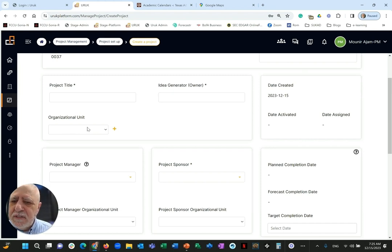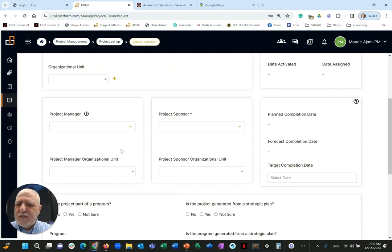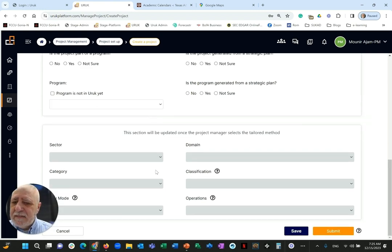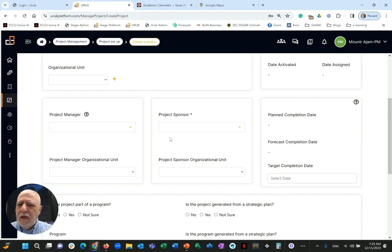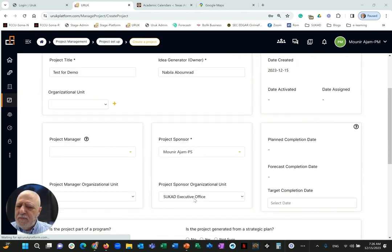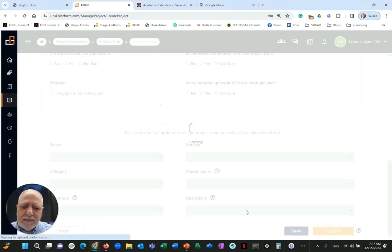For organizational unit, you have the opportunity to sort your projects and programs in the company — you can have up to three levels of units: a high-level section, then a division or department, and under the department a unit. You'll notice the project manager is not a required field yet, because at this point all we care about is assigning a sponsor. Then you have information about whether the project is part of a program, and information about tailoring the project — though those are locked until we do the tailored method step. We filled in the necessary information: the requester name, the idea-generating name, the project title, and the project sponsor. Everything else is optional.